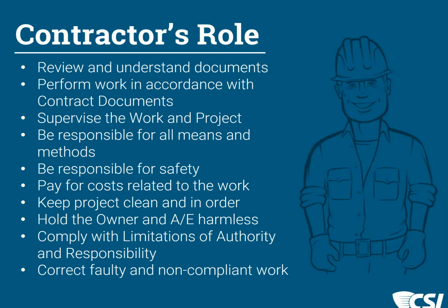And in that process of maintaining the work, whether the work requires submittals or not, they're responsible for maintaining the schedule of those and being sure that those submittals move through the hands of the architect and engineer in a timely fashion so that materials can be on the site when they need to be and can be implemented or installed as necessary.